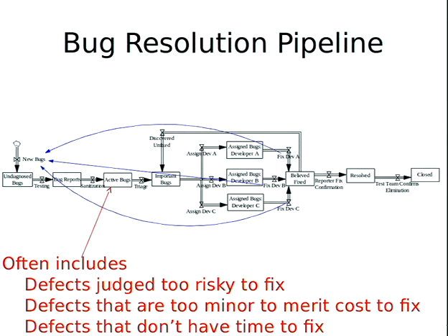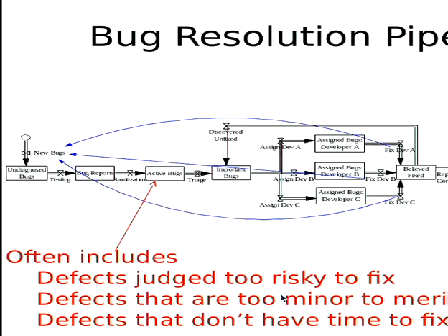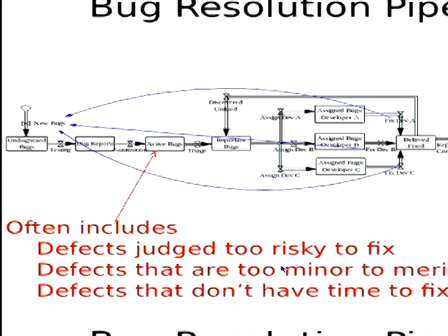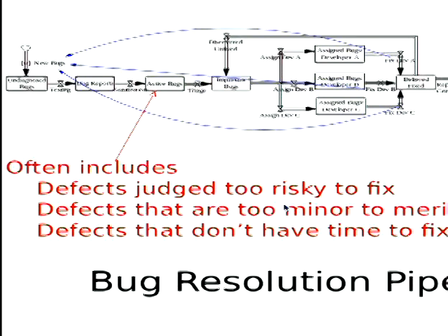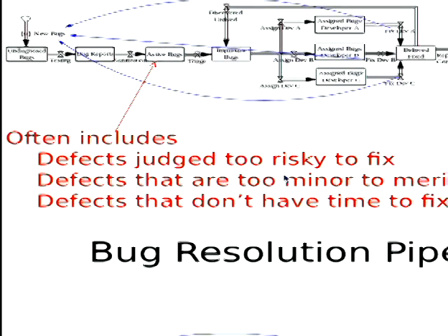Now, this active group here, as I mentioned, often a lot of defects will stick there. If they're too risky to fix, risk is absolutely key. It's key because there's uncertainties and there's limited time. And you're not sure how effectively we can fix this thing, and it's a bridge too far, and you decide, let's leave this thing. It's the devil that we know.